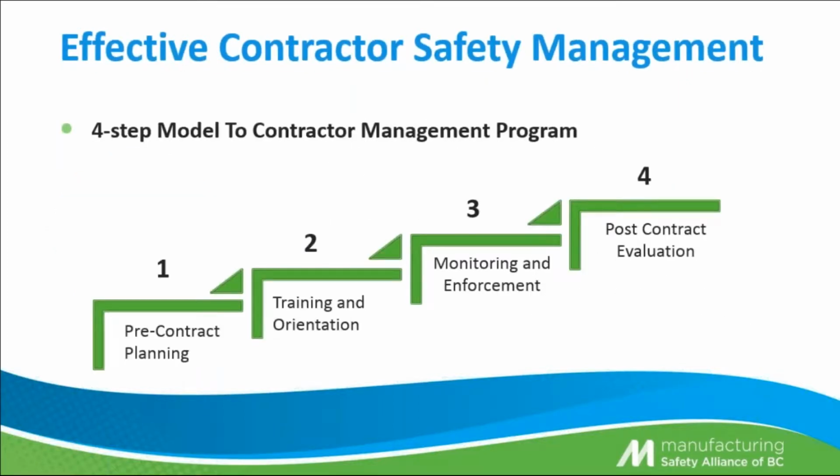We've developed a 4-step model for a contractor management program. There are 4 basic steps. First, the pre-contract planning. Second, the training and orientation for your contractors. Third step is the monitoring and enforcement to ensure that your expectations are met. And lastly, a post-contract evaluation to see how well you did.